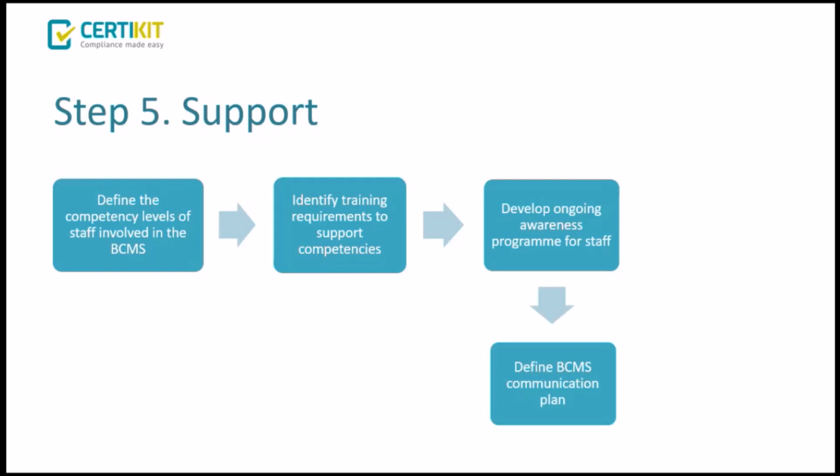And then you need to create a communication plan for the business continuity management system. Within this, you need to be able to identify what needs to be communicated, when it has to be communicated, who it needs to be communicated to, what the process or format of that communication is, and finally, who is responsible for that communication.